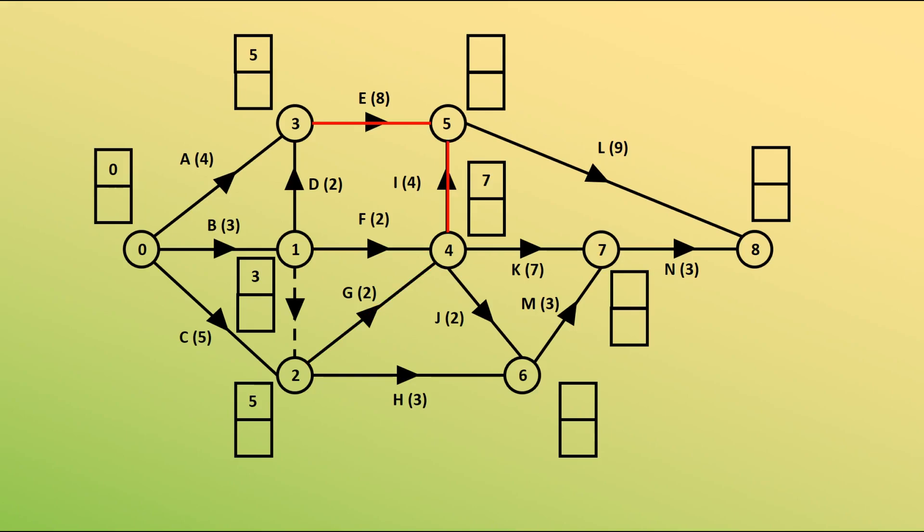Node 5 has two activities going into it, so 5 plus 8 is 13. 7 plus 4 is 11. We want the bigger of those, so 13 is the time there. Node 6 has J and H going into it. 7 plus 2 is 9. 5 plus 3 is 8. 9 is the larger one.